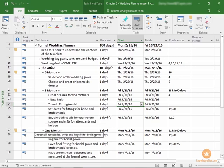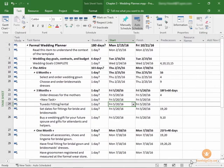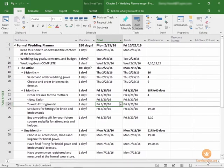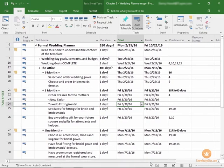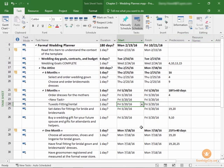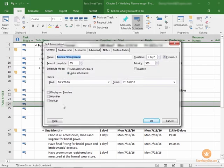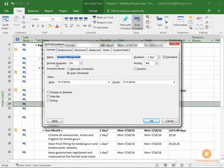Now we can add more details to our task, and this is known as setting the task parameters. As you can see, there are more columns out here, but this task sheet is only going to list a few of the common attributes to each task. You can customize this by inserting and adding more, which we discussed in a previous lesson. If you would like to access the Setting Task Parameters menu, you can simply double-click a task like this, and the Task Information window opens. Just like the Project Information window, this Task Information window allows you to add much more detailed information. For example, is this somewhat completed? If only three out of your four groomsmen have their tuxedos rented, you might want to put that this is 75% complete. You can choose whether or not the duration is estimated.